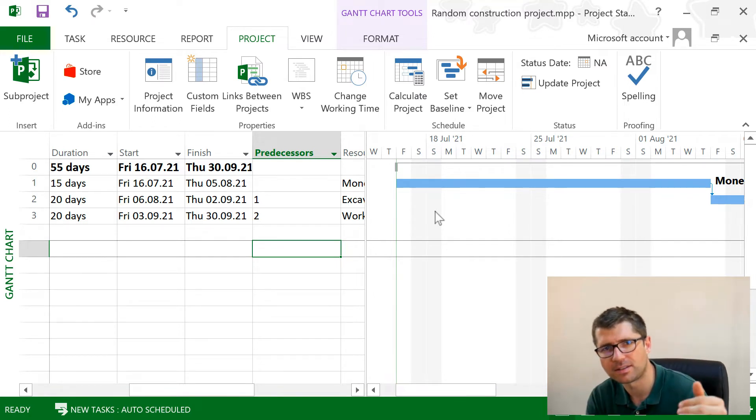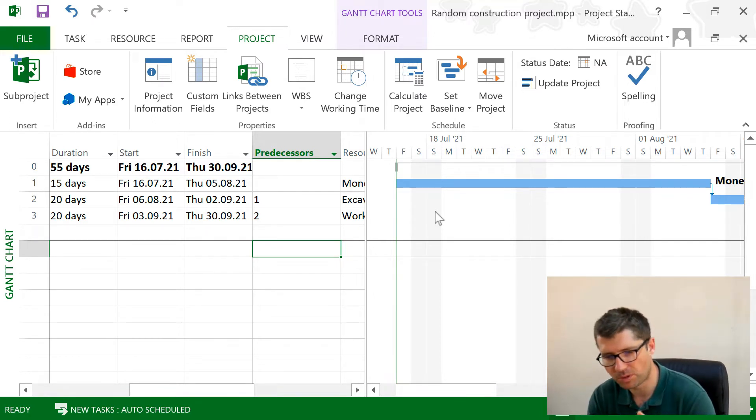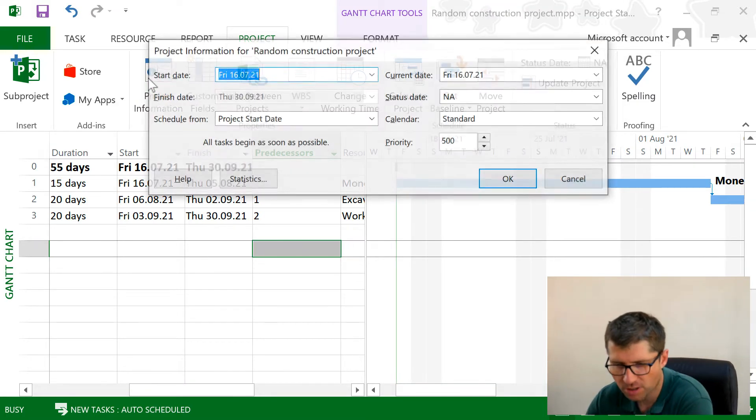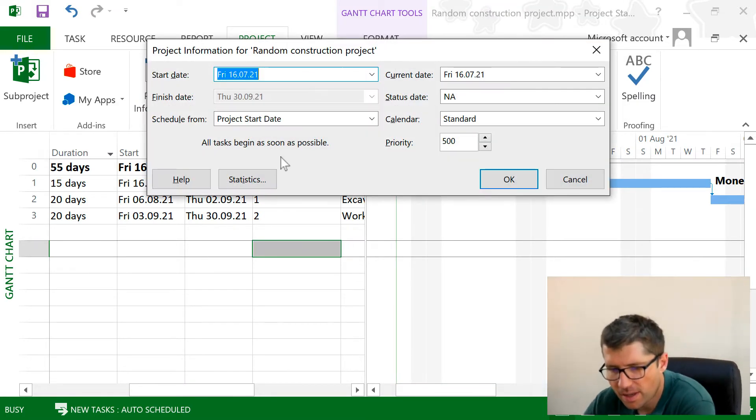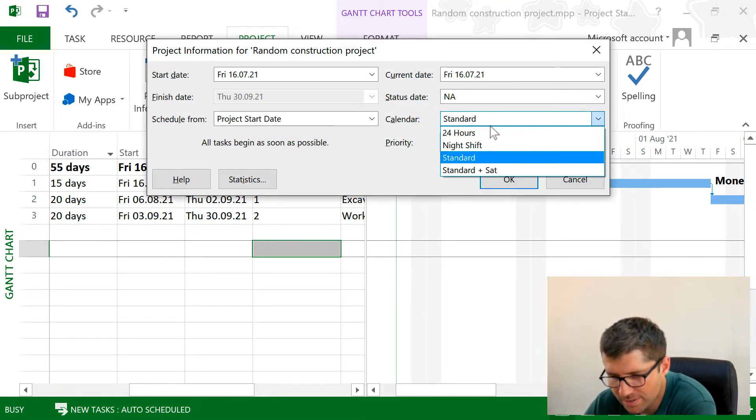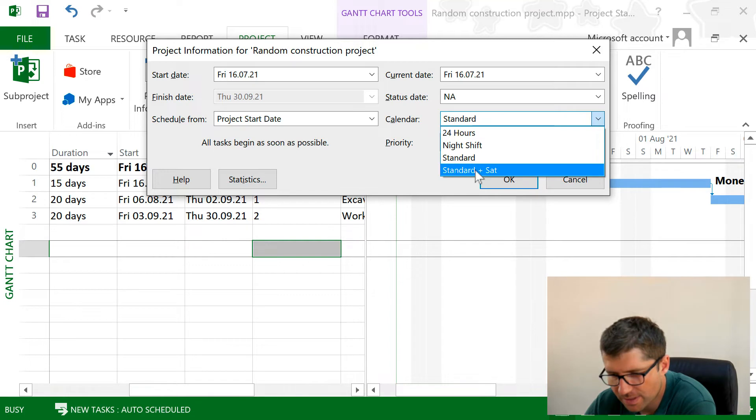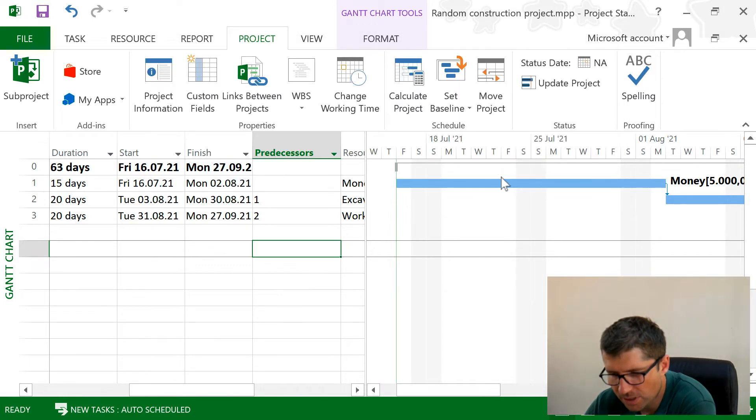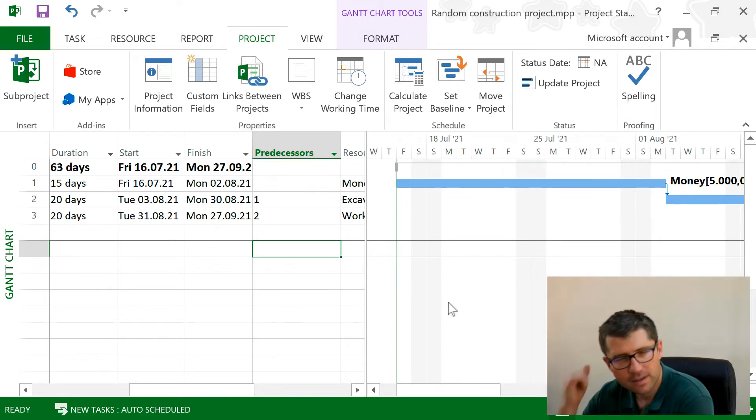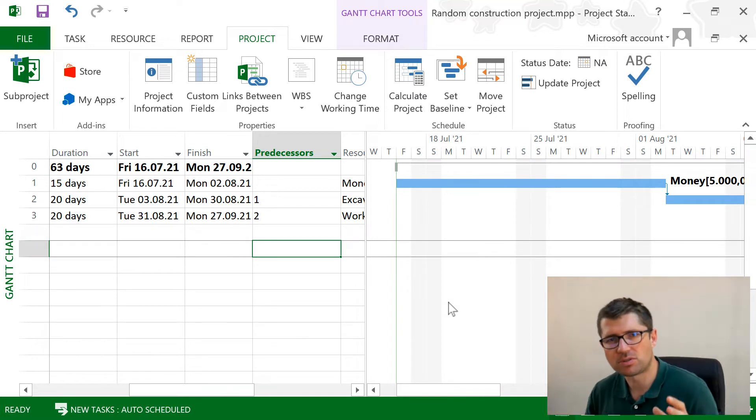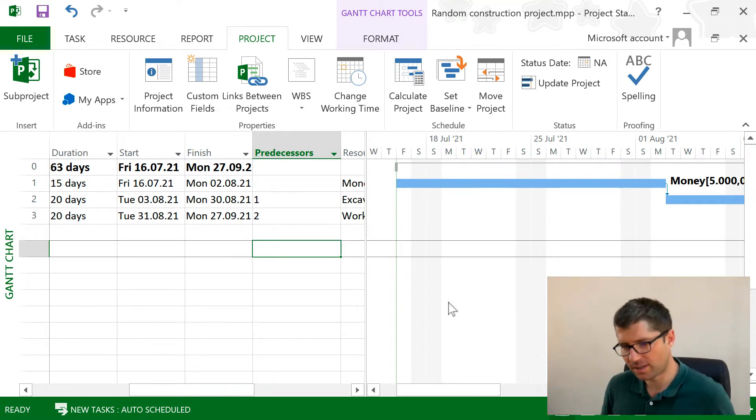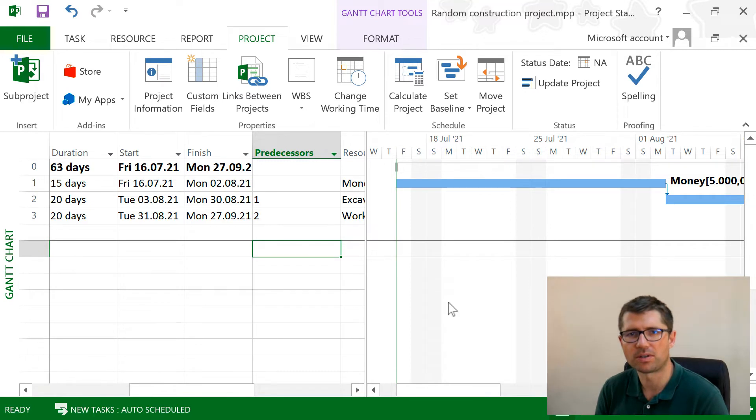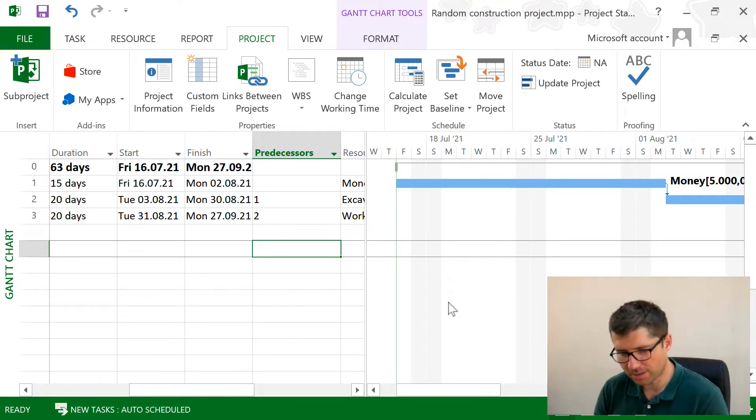Let's do this. I'm gonna use the Project Information option, and I'm gonna use the calendar as Standard Plus Saturday and click OK. Another thing happens: the tasks get rescheduled. I think the project gets a little bit shorter because I'm working on Saturdays.